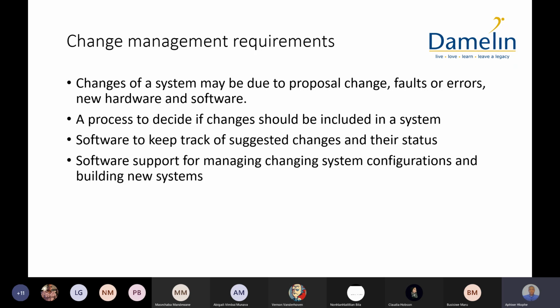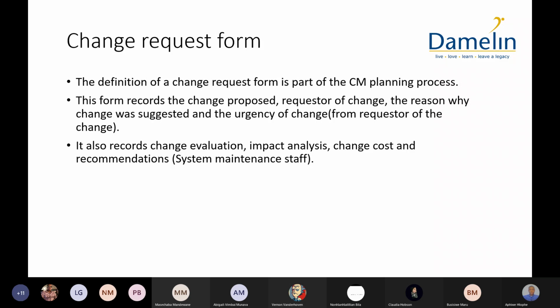There will be forms that people who want to implement change have to fill out, but they're not going to be physically printed forms. It's going to be on some sort of software, and then the change goes through the different stakeholders involved for approval purposes. So there will definitely be some sort of software involved where the change is put in a pending state once it's initiated, waiting for approval from external or internal stakeholders.